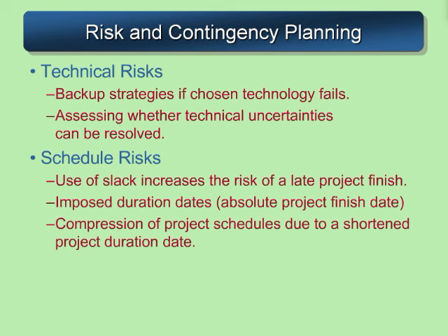And within the technical risk mode, we should be able to assess whether those technical uncertainties can be resolved. If they can't be resolved, you should have another plan in place that doesn't use those technologies, or maybe consider whether that would be a point to cancel the project.